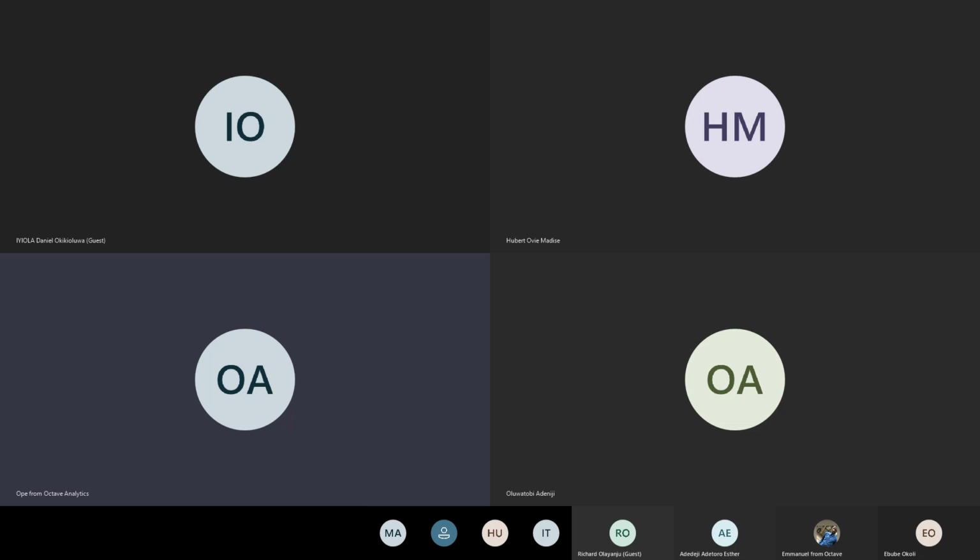At the end of the 2 weeks, tasks that are yet to be started or pending are moved to what we call the sprint backlog. In the sprint backlog, you have tasks that maybe you moved to a later time.